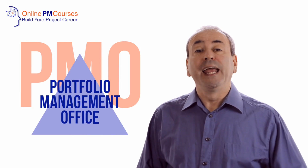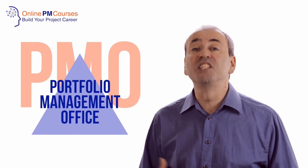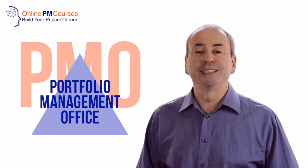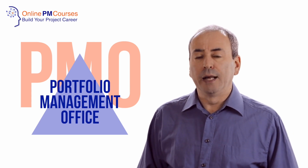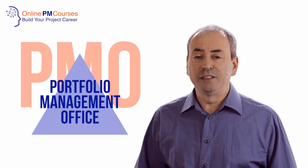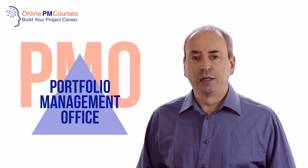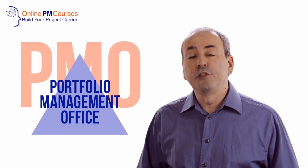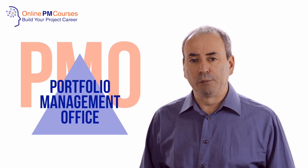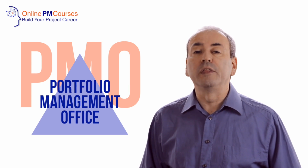A portfolio management office is much more strategic in nature. It often thinks on the long term, anything from 3 to 5 to 10 years. Its role is about crafting a portfolio of projects and programs which will take the organisation forward during that long term. And therefore, its roles and its functions and its activities tend to be strategic in terms of identifying and selecting the right projects and programs and making sure that the infrastructure is there to support them and to see them succeed. The strategic planning and the coordination of the projects and programs is at the highest level, and therefore a portfolio management office will interact directly with the highest tiers of the organisation, often with the main board.